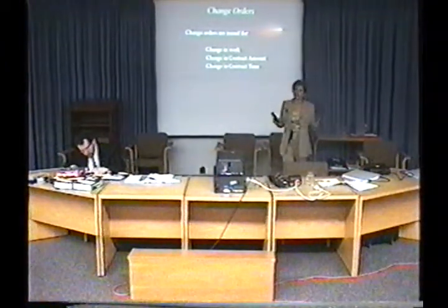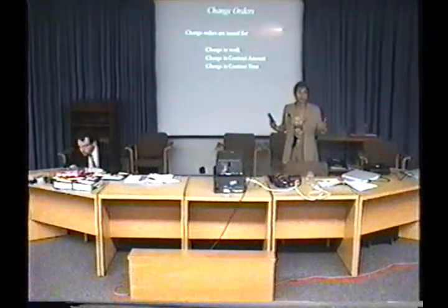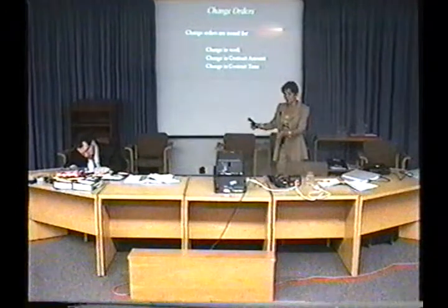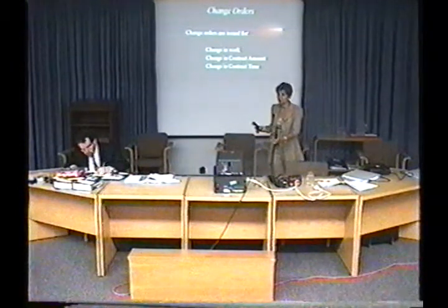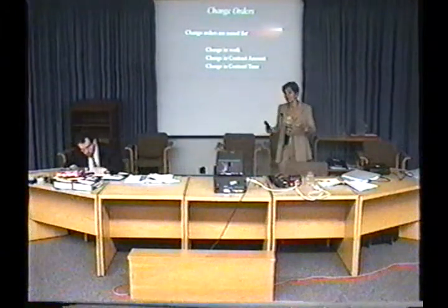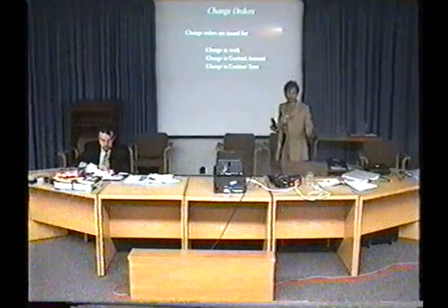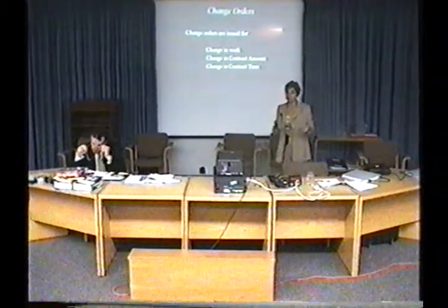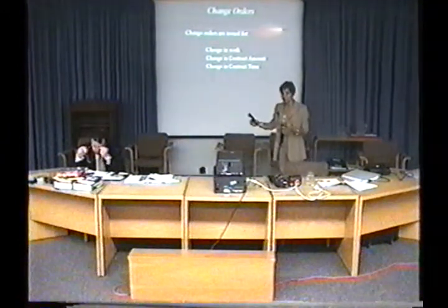A change order is when you are in construction and you decide that, instead of putting ceramics in the front lobby, you want to put granite. Now you have to issue a change order. The contractor has to price it. The contractor knows that he's on the site, he's not going anywhere, and you're not going to bring somebody else to do that job. So he may try to make the most of it.